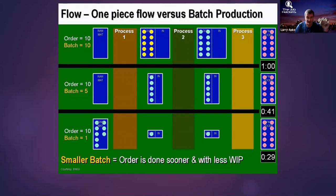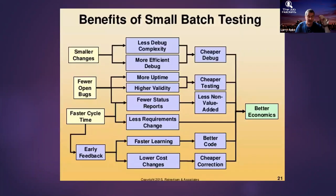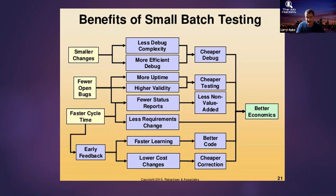We're going to talk about optimal batch size and how to compute it, but first let's talk about the benefits of smaller batches. This is directly from Reinertsen's book. Benefits of small batch testing: when you have smaller batches, you have smaller changes to the system you're creating, so it becomes easier and more efficient to debug.